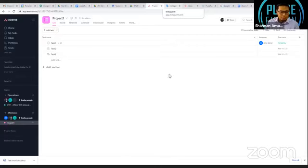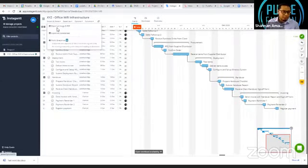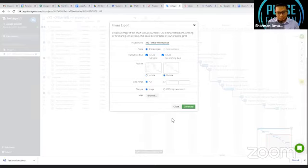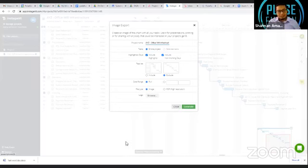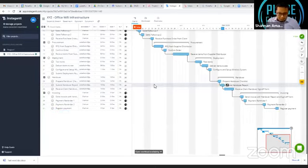There is a difference between access to Instagantt and access to Asana. Clients cannot access Instagantt by default, but they can access Asana directly. If you don't want clients to change due dates, don't give them Instagantt access. Instead, you can export the Gantt chart as a PDF directly from Instagantt - click Generate and it creates a PDF of the Gantt chart immediately.